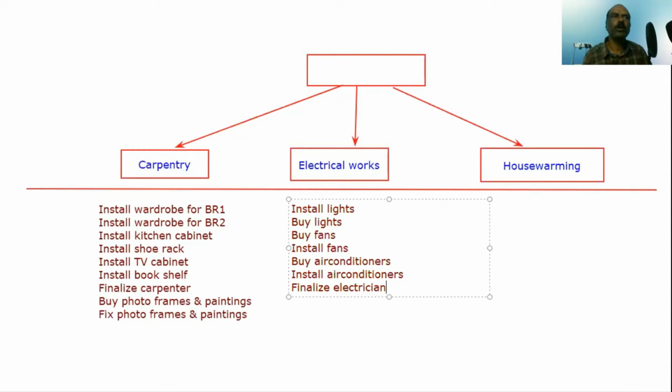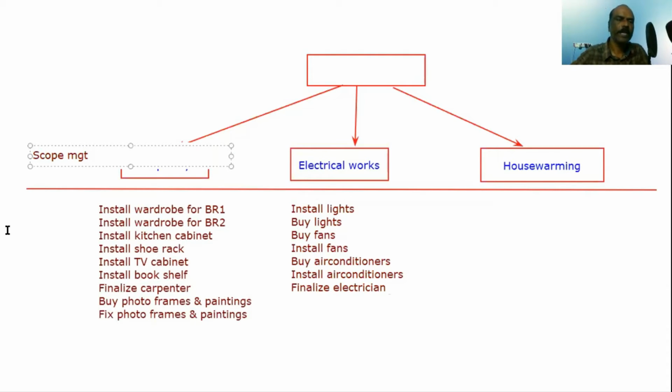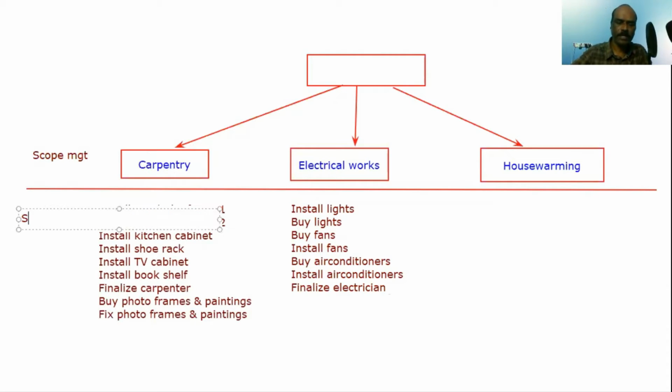That is the level you want to break. You don't want to break beyond that level in a work package. A work package should be some kind of item that has more work, but at a higher level. So this level here, until here, is done in scope management. Anything below here is done in schedule management. Right? You need to understand this difference.